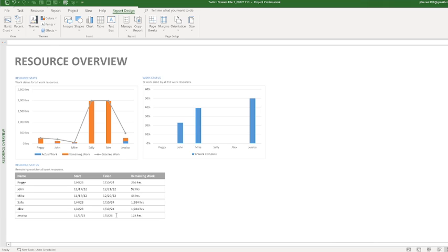I don't want to say mundane, but they're constantly done, but they're not so specific and discrete that it justifies steps in the schedule because you're constantly doing them, like operations and maintenance, break fixes, server downtime, whatever that may be. So an LOE will cover things like that.